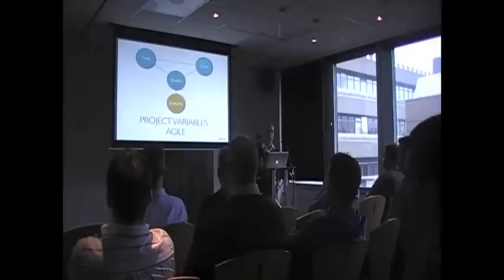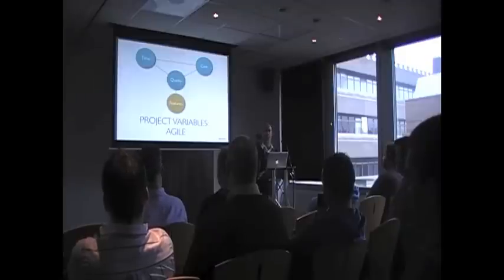So a grown-up conversation, we cannot deliver all of these things that you want by that date for that amount of money. So the main idea at that point is to prioritise and work with the client as closely as possible to figure out what they actually want, what is going to be the minimum amount of that feature set to get the site live that will make them happy by that date for that cost base.